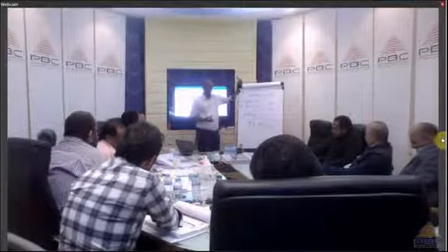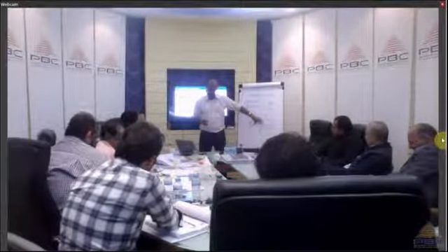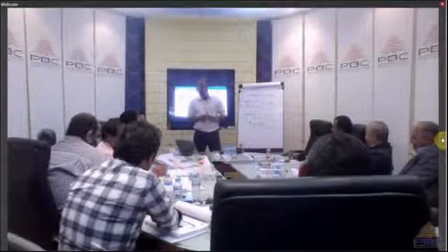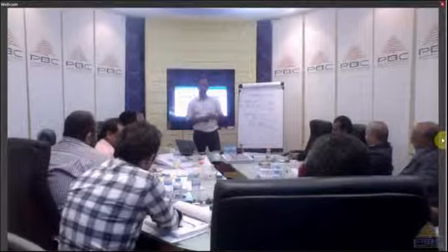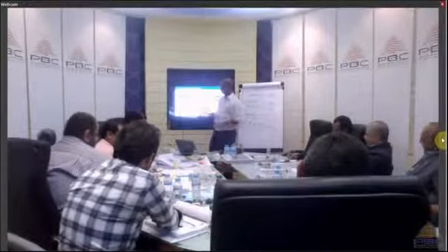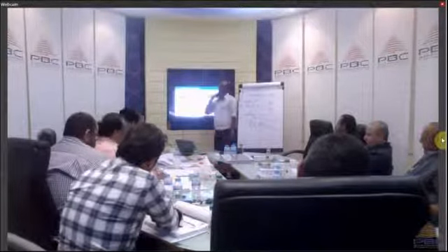Divide exactly. I'm giving more weight here to the most likely, and then I'm dividing by 6. So it's an average. This is called the PERT form. Okay? So this technique is called a 3-point estimating technique.